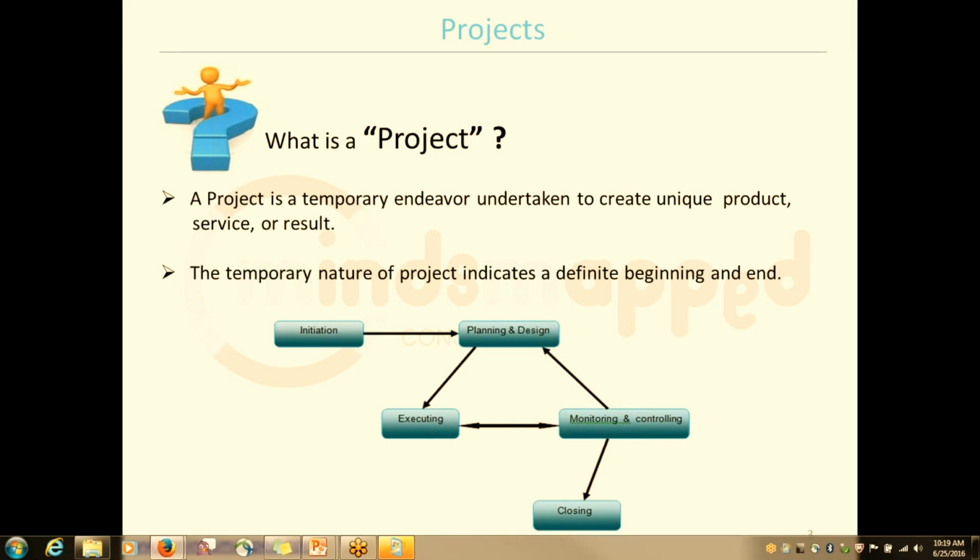So I was talking about the initiation. When any project gets initiated, we first have to create the business case for it. In the business case, you would be stating what problem you are having, and how and why there's no roundabout solution for it. And in case we are achieving something by providing a solution to it, then how your business is going to benefit, how much money or how much revenue the complete system or the complete organization will gain if we come up with a solution to this particular problem.